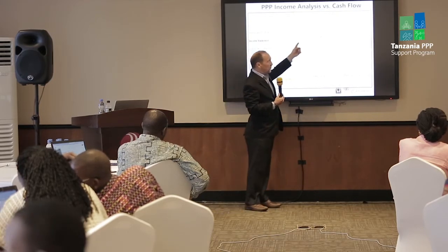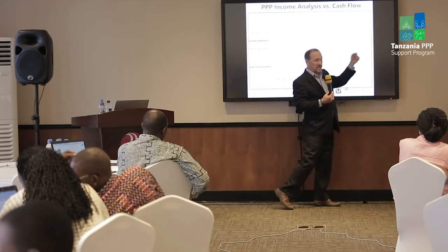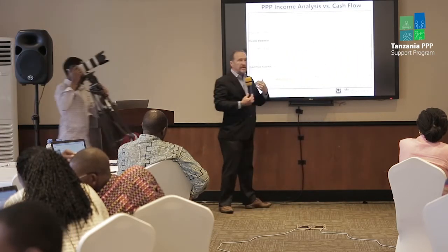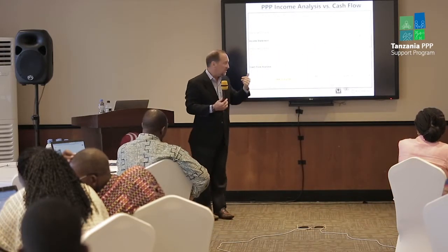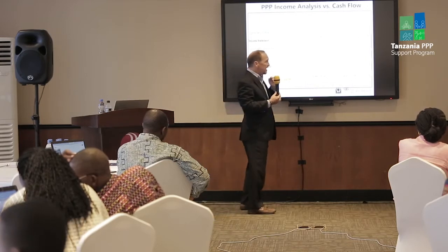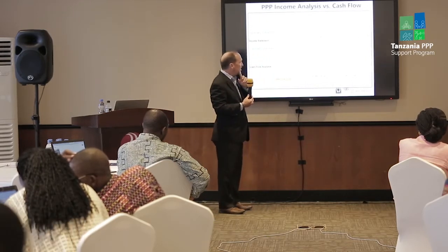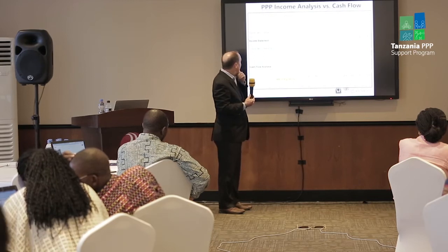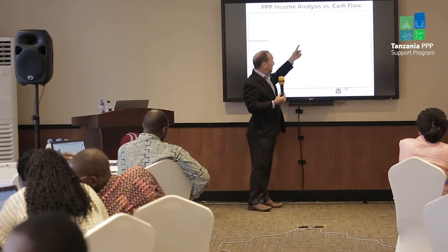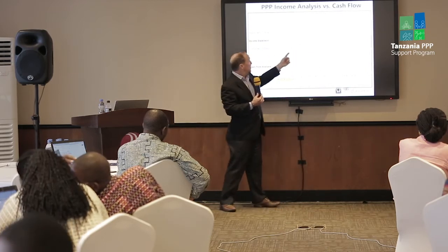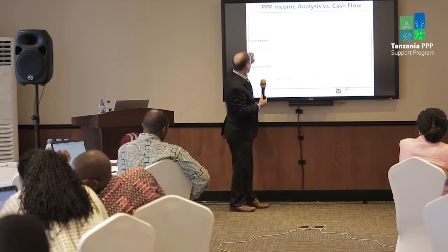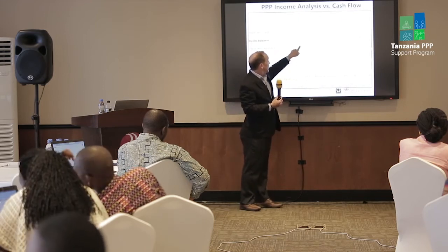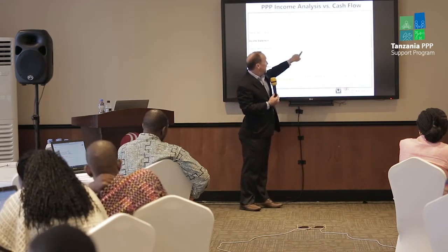Basically, you'll see here the revenues are the same for all 10 years of the project. They're at 50. We can make more complicated adjustments later on and show changes in income or changes in revenue, changes in expense. But I'm trying to keep it simple for this first look so we can see it all on one page. We've got our O&M costs here at 29. Because this is our income statement, profit and loss, we're recognizing depreciation, right? All right, and then the revenues minus operating expenses minus depreciation, that's 11.